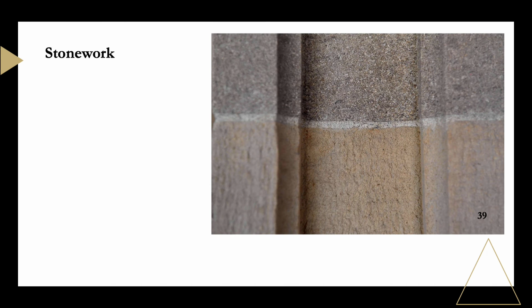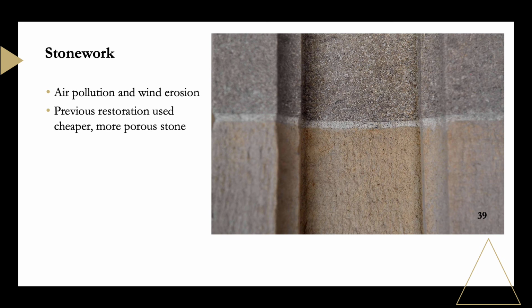The stonework was also more damaged than expected from air pollution and wind erosion. The quality of every piece was studied, and in total, 700 hand-carved replacement segments were used, crafted at an on-site facility at the tower base.